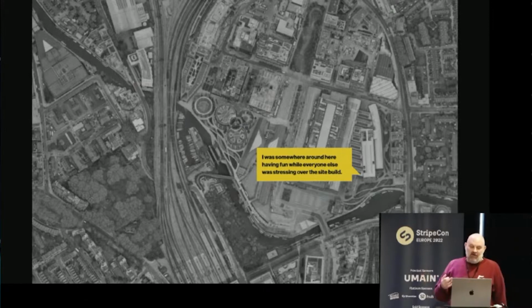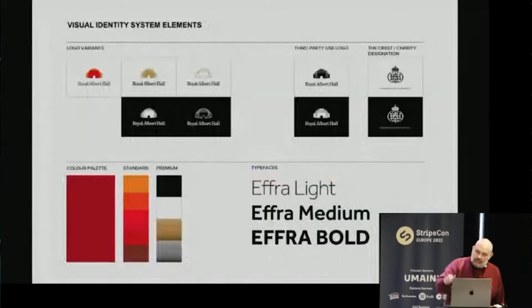I was able to show working examples and make the case where I felt certain design decisions wouldn't work in the real world, and I could show working examples of why, and then offer alternative approaches. This sped up the process exponentially. If I remember correctly, we set aside 2 weeks to do the reskin with the new branding, but the majority of the work was completed within the first 3 days.